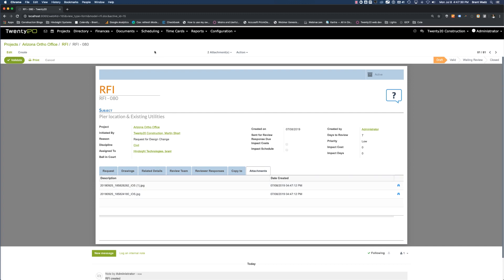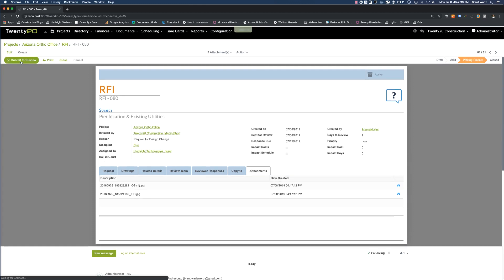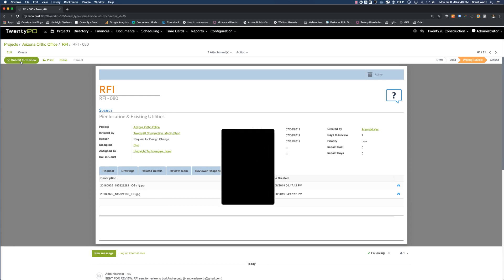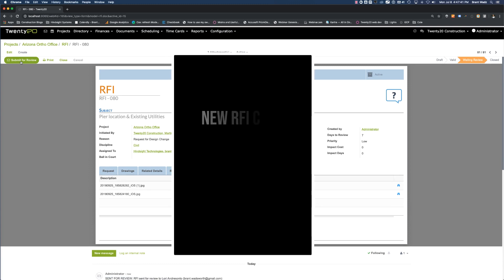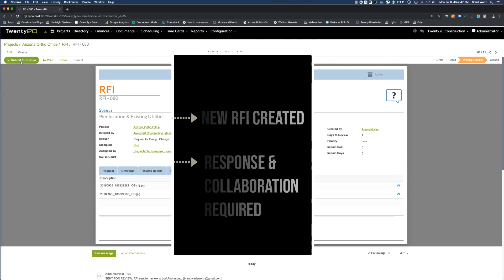I'm going to go ahead now and validate this. This looks good. And I'm going to hit the button to submit for review. That's going to send an email notification out to the review team letting them know that a new RFI has been created and that their response and collaboration is required.